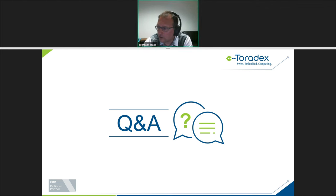How long does basic certification take? So if you need to do FCC part 15 in North America or FCC part 22, and it's really just basic radiated emissions, if you just want to make sure you are within the limits, that can be done typically within a few weeks. It's just a matter of when you will have the prototype done. You will need a little bit of test software. You will need to prepare all your cables, everything that you need to certify with that unit. Then you can schedule your time in the lab. You go to the lab. If you pass, you will have your certification probably within a few days. So it can be 2 to 3 weeks if it's one simple test and you've passed. If you have multiple tests, you can easily budget 3-4 months, I would recommend. So it depends case by case.